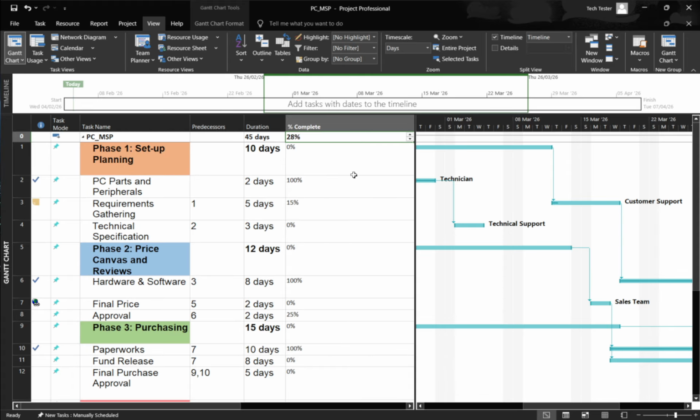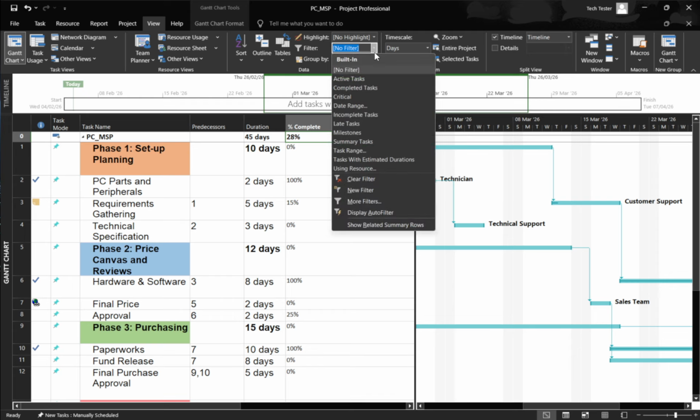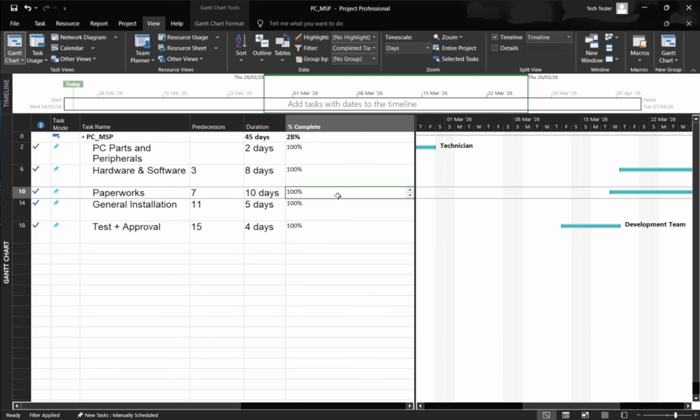There's also a fast shortcut when you need everything visible right away. Press the F3 key on your keyboard. This removes all filters, both standard filters from the ribbon and auto filters from column headers, in the view you're currently working in. It's a reliable way to reset the display and confirm you're seeing the complete list of tasks again.